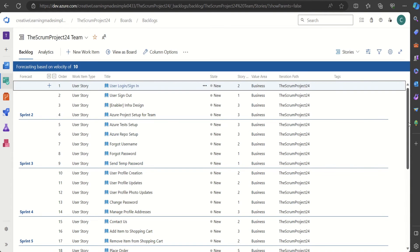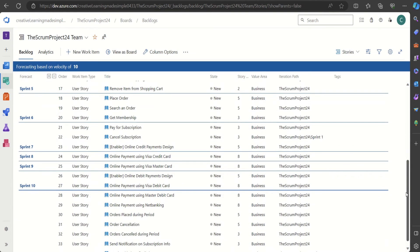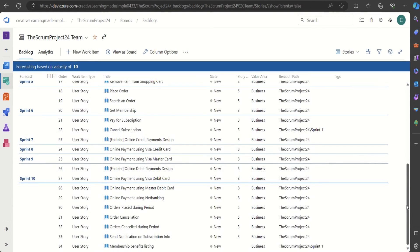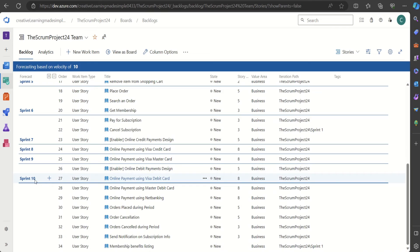So likewise it's showing it's going to take more than 10 sprints. These are the items which are part of Sprint 10, so we can get an idea of that. Velocity is basically of two types: one is planned velocity — for a new team we plan a velocity, deciding how much work the team can take on.